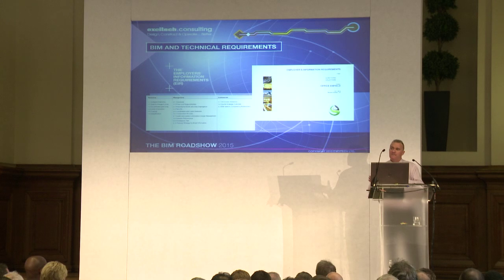I'm going to recommend full Revit delivery in terms of design. I've worked on projects with Revit before. I find Revit to be a smooth managed process in terms of design. It allows collaboration. It's also bi-directional in terms of data. And importantly, it links into the client's existing CAFM FX 360 system. I'm also going to define key dates in the EIR for when the client wants to see the data and also models of the virtual construction as the project moves forward. I'm also going to recommend, and I have recommended, that we define and specify the data the client wants to see and use in his spaces management and asset management system.